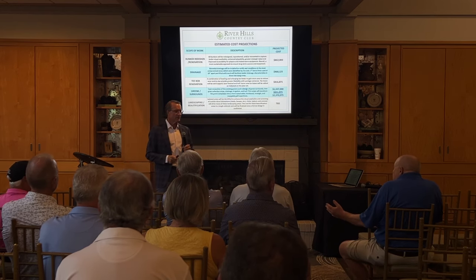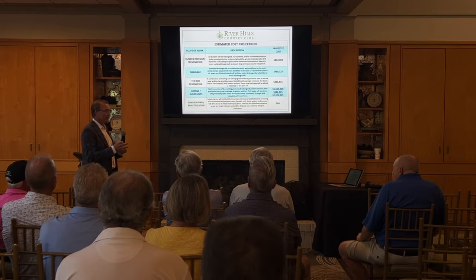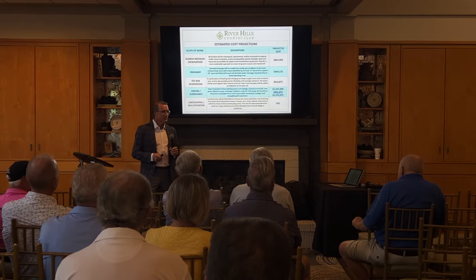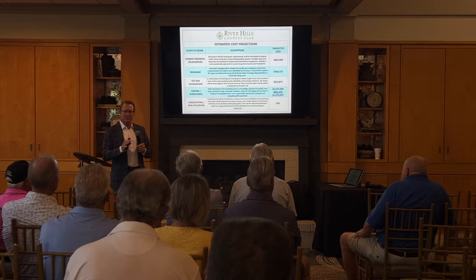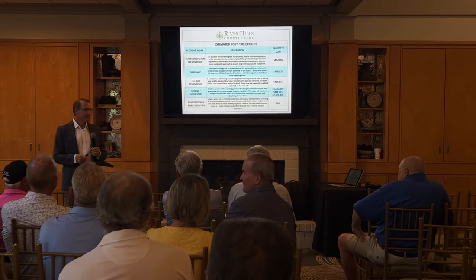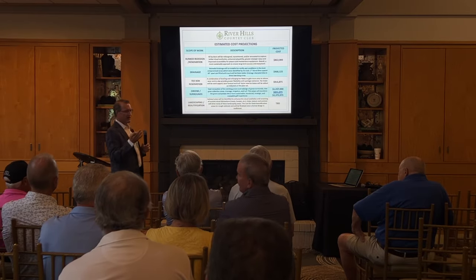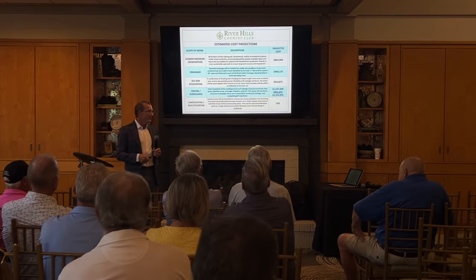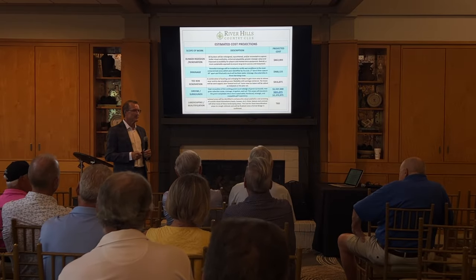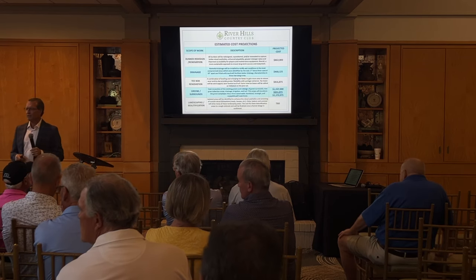I don't know. Historically, I would say somewhere between 5 and 8%. All the materials are different, whether it's pipe, gravel, sand, diesel fuel, etc. And that's a total guess. But I know during the COVID times, it was very volatile. Now it's settled down. So if you did this in a year, you can probably expect somewhere between 5 and 10% increase.